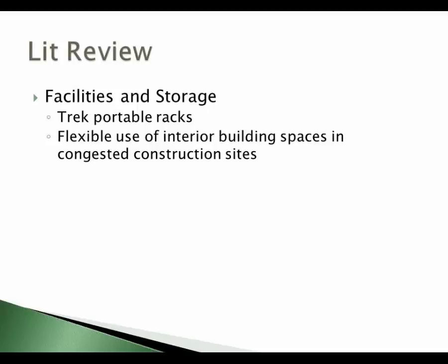Another source that I found was of flexible use in interior building spaces in congested construction sites. In construction sites, material handling and storage happens in stages depending upon the materials that come for the different stages of construction. And while the inside of the building is still a shell or it's empty, it can be utilized for the storage and material handling area and be utilized for different places. This might be applicable for Boltabout because they'll have limited space, and during different stages of assembly and operations, the space should function in different ways. So this would be a good reference.